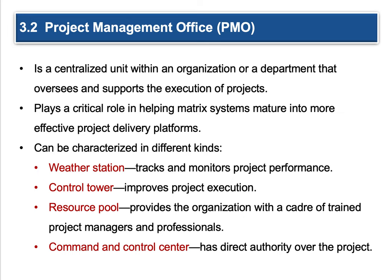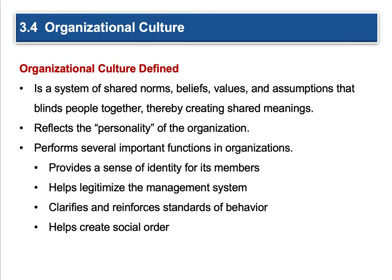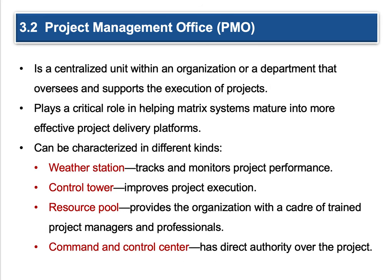The Project Management Office — otherwise known as a PMO — is a centralized unit within an organization or department that oversees and supports the execution of projects. It plays a critical role in helping the matrix system mature into more effective project delivery platforms. There are different types: a weather station tracks and monitors project performance; a control tower is very controlling and organized, directing project execution; a resource pool provides the organization with a cadre of trained project managers and professionals — like a pool of experts you can pull from; and a command and control center has direct authority over the project, like a strong matrix with a lot of influence.